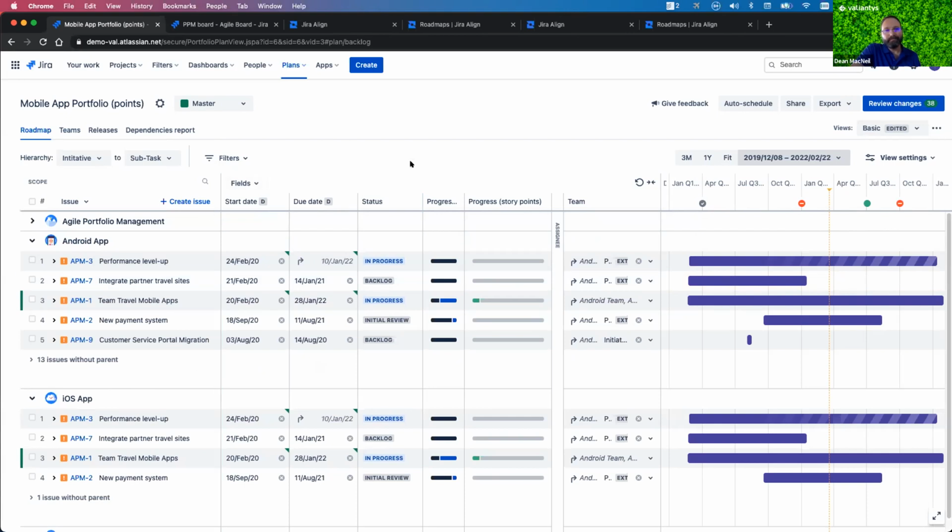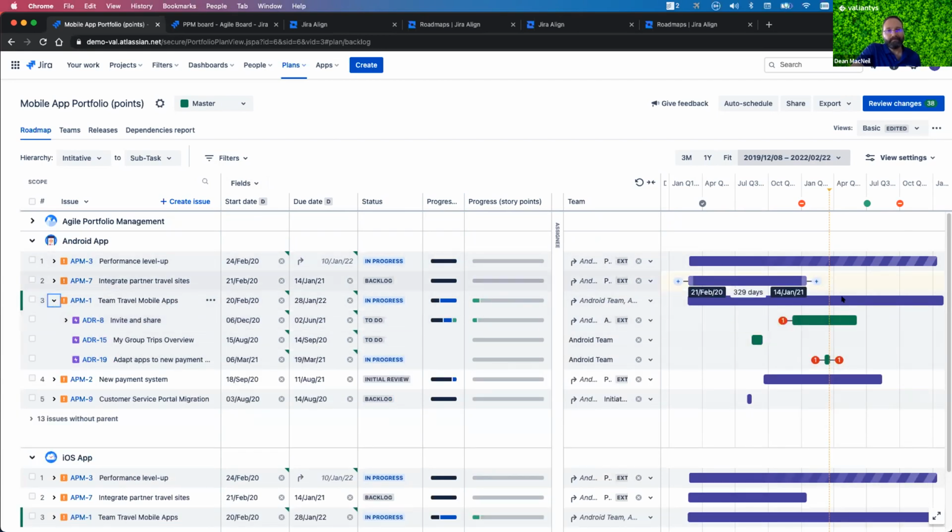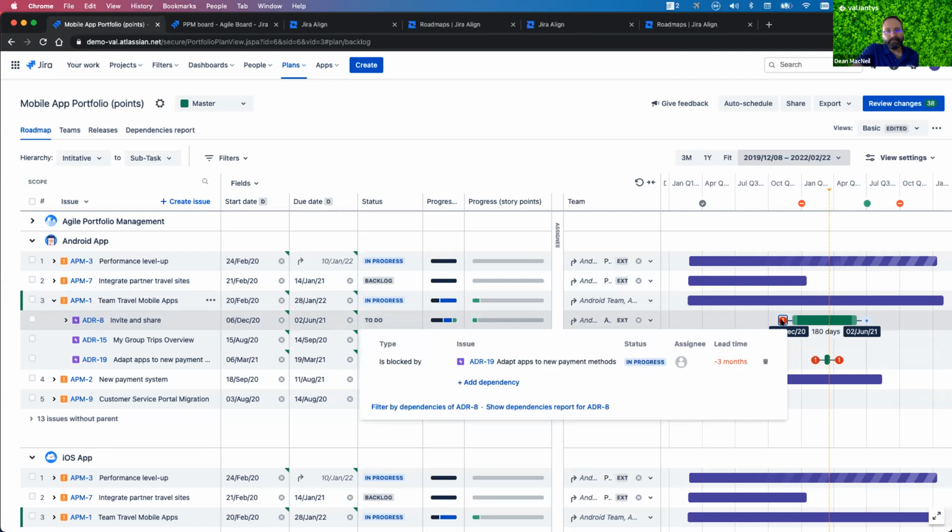One thing that is very important, and you may have seen it when we showed the roadmap here, is dependencies and how Advanced Roadmap manages that. Each item here, and it's pretty clever because you might not have all those work items or dependencies visible here, but you do have this red indication that we have a dependency prior to this. So this task is blocked by another task, and we have the lead time calculated for this. Similarly, if this task would block something else, we would have that little red indicator here.